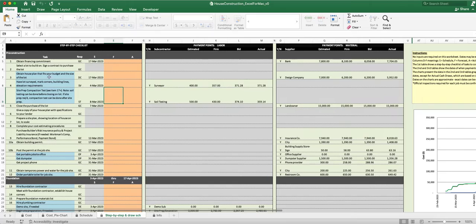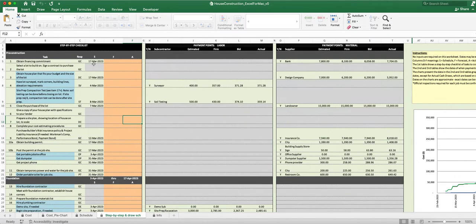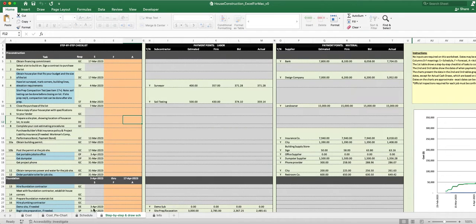For example, in the planning stages, a lot of those items appear here in the pre-construction part: obtain financing commitment, go to a bank and secure the loan; select a lot to build on and sign a contract to purchase it; obtain a house plan that fits your budget and the size of the lot — that ties back to design services. The orange cells here are just notes with no effect on calculations. The dates shown here come from the schedule tab you set up, and the dollar values come from the cost tab.